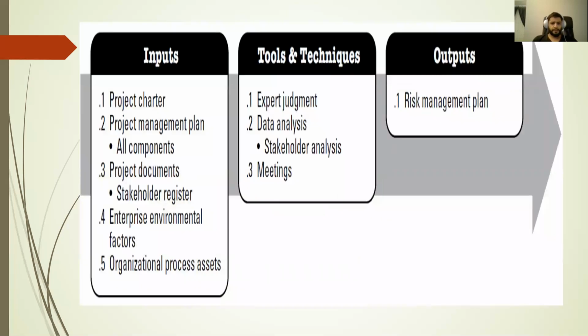For the risk, the input is the project charter, project management plan all components, project documents, stakeholder register, enterprise environmental factors, organization process assets. The tools and techniques are expert judgment, data analysis, stakeholder analysis, and meeting. The output is only the risk management plan.